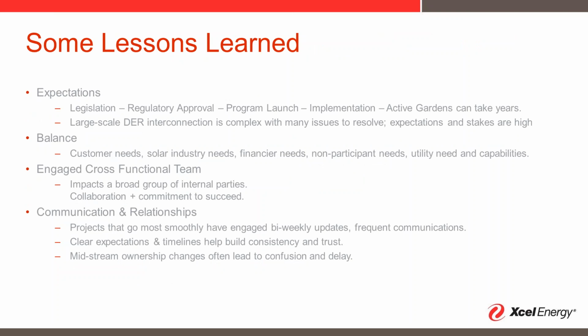So this is just a high level, some lessons learned. Expect things to take some time. I think everybody was a little surprised at how long it took from our 2013 legislation till the first gardens started coming online at a pretty good clip at the end of 2016. There were a lot of things that needed to be worked out, both in terms of the process to take on that much distributed energy and the analysis behind that, and the field and design and construction crews to support it. It took a while to figure that all out.